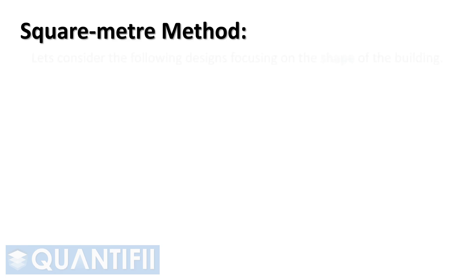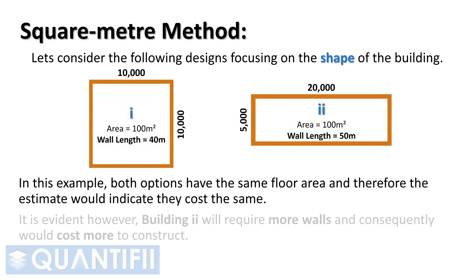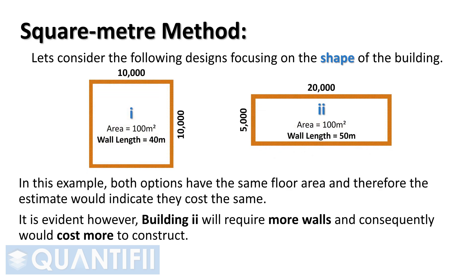Let's consider the following designs focusing on the shape of the building. As you can see in this example, both options have the same floor area, and therefore using the square meter method of estimating would indicate they cost the same. It is evident, however, that building two will require more walls and consequently would cost more to construct.